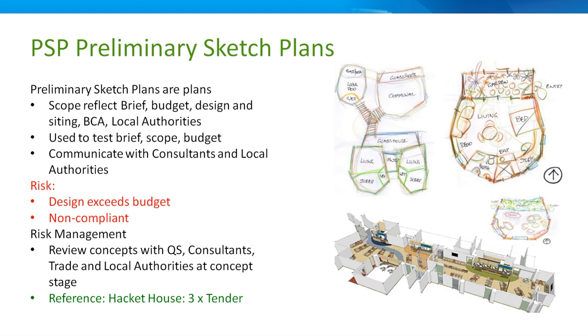I've had this experience nearly every year with some particular government departments, not yours, where they've got money allocated but they haven't scoped it. So if you actually get a scope in the first meeting and come back and say, look, the range of building costs for a basic building to a complex laboratory are this, you haven't finalised your budget. You can do it almost within an hour or two, getting a rough idea.